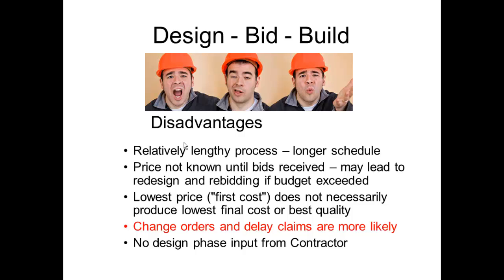It could be a number of things, anything outside or superficial to the project that could be taken out. Maybe we take the landscaping and we cut back on that and don't put the plantings in, or do the plantings on our own time. So those types of things that the owner might be able to take care of themselves, we look at first.